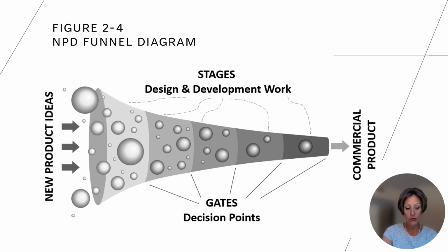Amongst the success factors was incremental investment to address technical uncertainties and a way to link product development activities to corporate strategic objectives. In the first instance, the staged and gated system addresses technical risk, how we do it, by setting telescoping experiments and trials. With each stage of work, the investment increases while the technical uncertainty correspondingly declines. Project spending increases as the project advances through subsequent stages, yet overall risk declines because more knowledge is gained in each stage to hedge against unknowns.